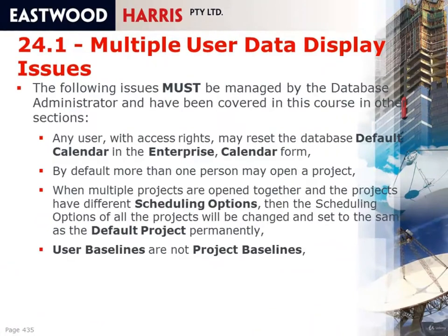The next topic is user baselines are not project baselines. When you set a user baseline, that baseline is only available to the user that has set it. So if another user opens up a project that is using both the project baseline, say for the original baseline, and the user baseline for last period, and applies the same layout, if they don't set the user baseline to be the same as the original scheduler, they will see the plan days.